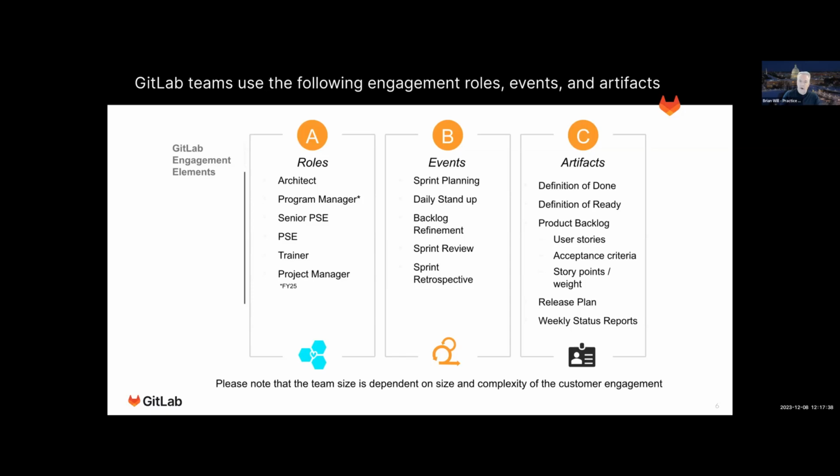Artifacts, definition of done. What does it actually mean to be done? There's always an interesting discussion. Every company is a little bit different. But one principle in all agile methodologies is basically you don't get credit for things that aren't done. So for example, if you have all the coding done, you implemented all the integration points, you tested it, you know it works, but it hasn't been signed off by the customer, you're not done.